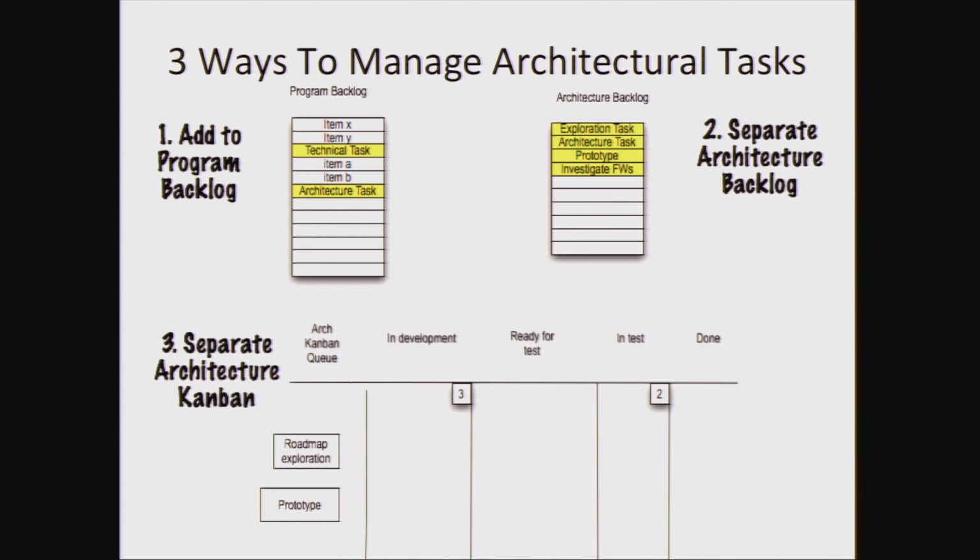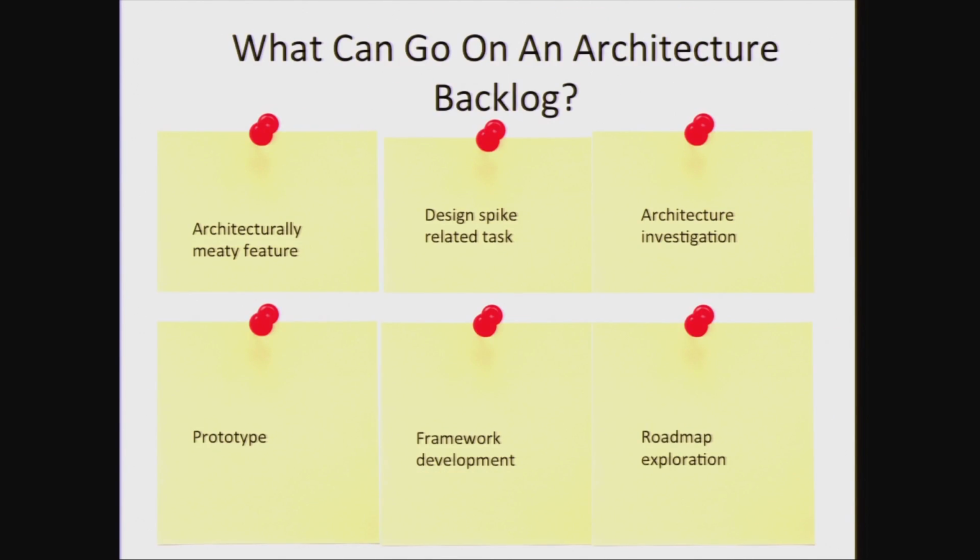I've worked with teams and companies where if we have a small architecture and infrastructure team, they have their separate backlog that supports other feature backlogs if you have larger feature teams. Or turning it on its head, if you have a small set of specialists or architects, they may have a workflow queue and the project architecture related work flows through them. Okay. So those are ways of talking about and managing and making architecturally relevant tasks visible.